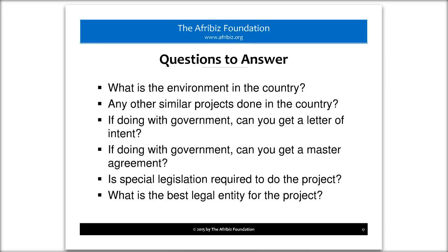The first commitment, typically to make it a project, is the site. If doing it with the government, can you get a master agreement, which means essentially that they're giving you an agreement that says, through all stages, from development all the way through, that you actually have a contract to do it.